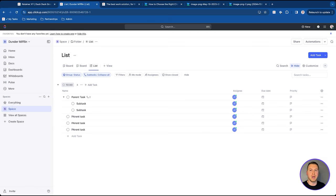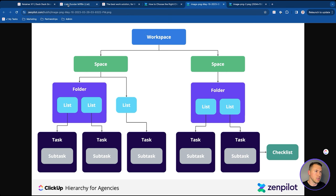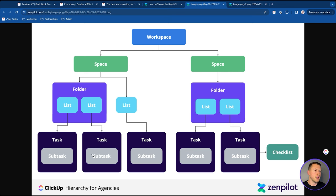Now that we know our hierarchy, let's talk about views. Views are super important because you can create a view at any level in the hierarchy. If I create a view at the everything level, I can see work across my whole workspace. If I create a view at the space level, I only see work within that space. At the folder level, only what's in that folder. At the list level, only what's in that list. You can create views at any level — workspace, space, folder, or list — but you'll only see the work within that location.